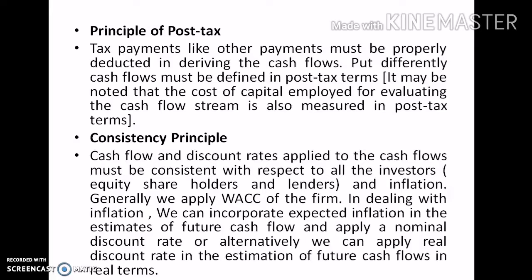That is, the cash flow and the discount rate applied to the cash flows must be consistent with respect to all the investors, that is, equity shareholders and lenders, and it must also be consistent with the current inflation rate. Generally, we apply the weighted average cost of capital of the firm.